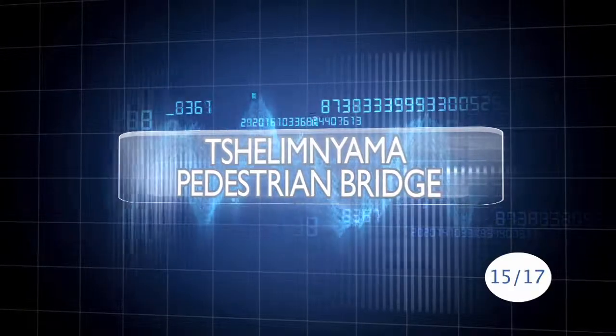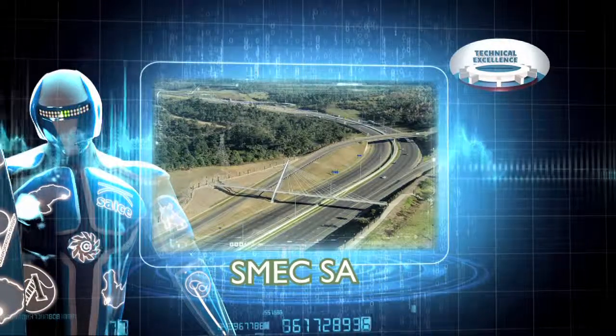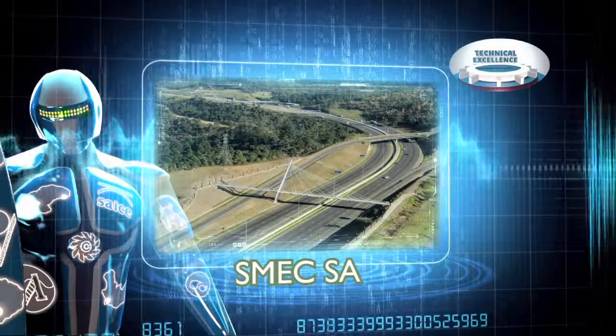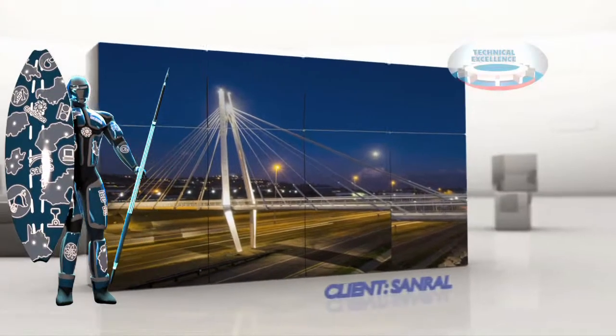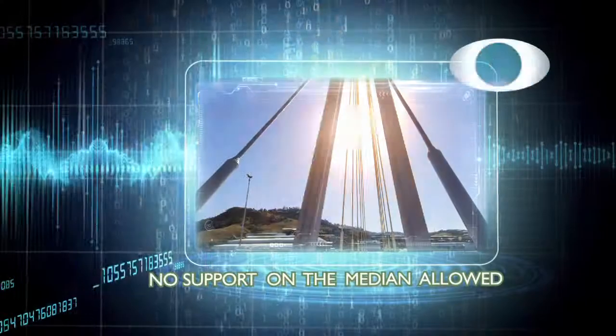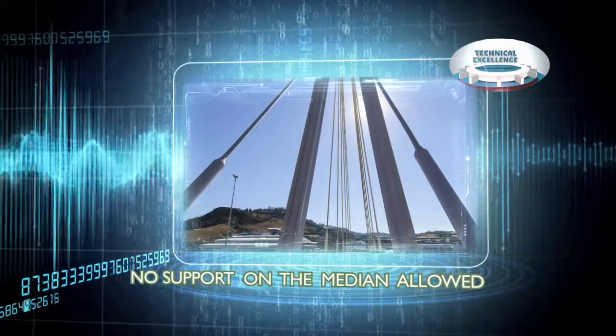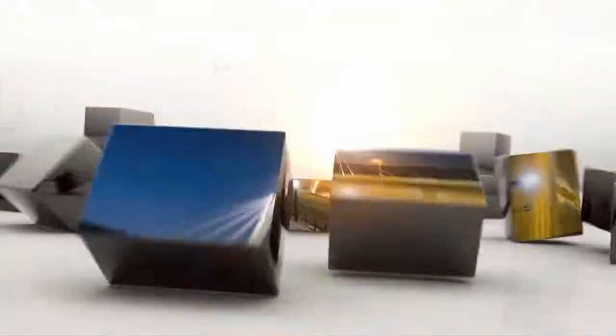Chelumnyama Pedestrian Bridge. SMEC South Africa submitted the Chelumnyama Pedestrian Bridge. Central commissioned SMEC to construct a bridge that would allow Chelumnyama residents to cross the N3 safely. The design had to anticipate future widening of the road, so no support on the median was allowed. The project cost approximately 7 million rand and was completed without cost overruns or variations in major quantities.